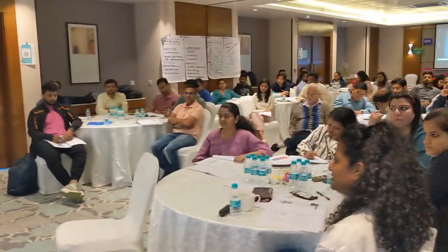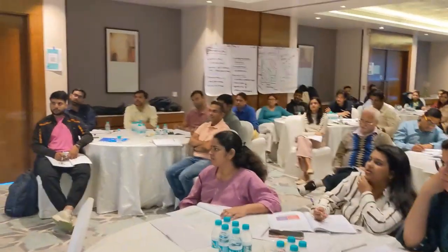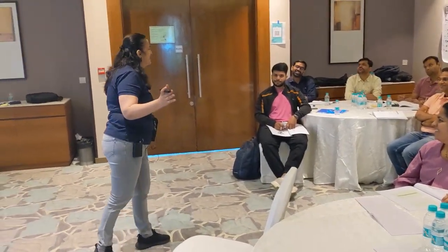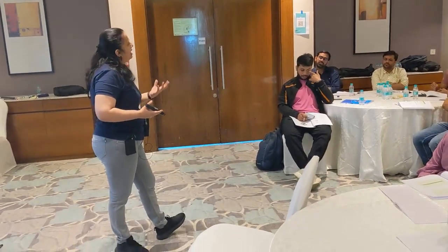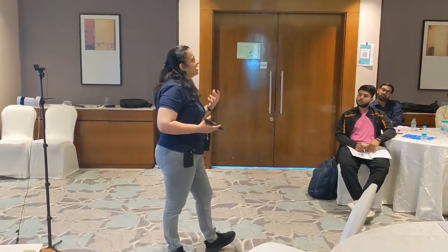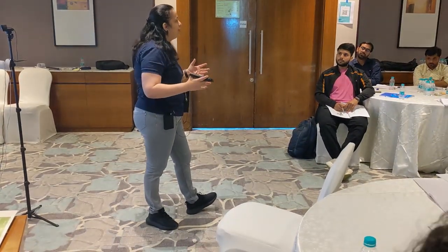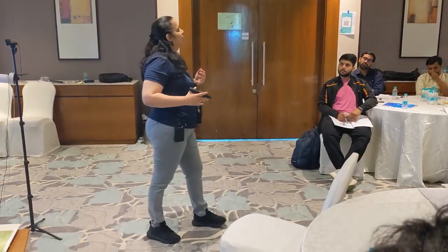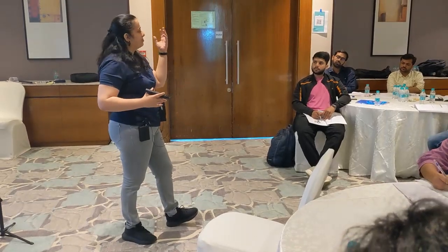Who conducts it? She has a question on who conducts this. Any of the Scrum team, the Scrum master, somebody say product owner, so the trifecta will be complete. Ideally anybody, it's the team who has created the increment. But when I am there in the Scrum team, I encourage the product owner to be the person who is at least starting and kicking it off, because the product owner works on a regular basis with stakeholders. So stakeholders are more familiar with the product, and the event goes more smoothly when at least the kickoff happens by the product owner.